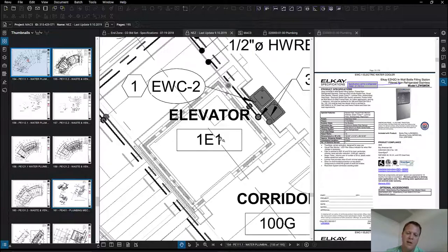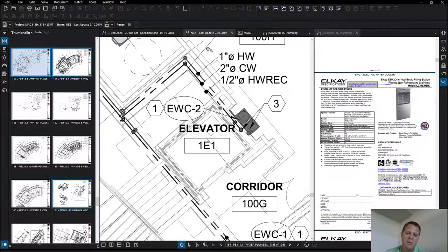But it's worthwhile looking at what the layering shows. So this is showing entry point to the elevator right here, and the elevator shaft kind of goes around like this. And elevator shafts are always fire rated, and elevators are super picky about people taking parts of the elevator shaft space. So guaranteed that pipe's not going to go in that spot. It's probably going to go above the ceiling like this, and then drop down the wall. And then we'd only deal with fire rating. No big deal.